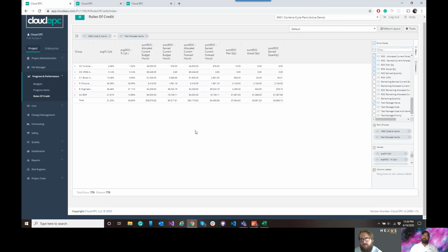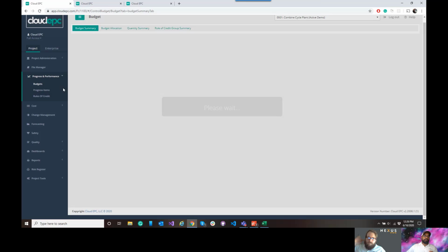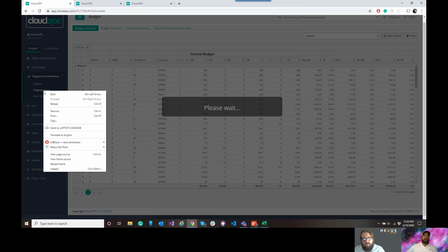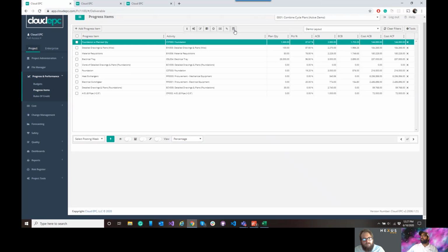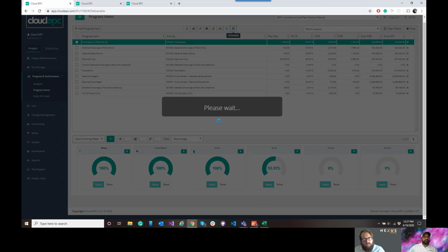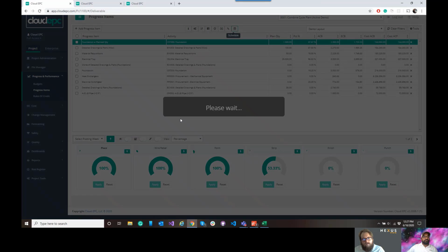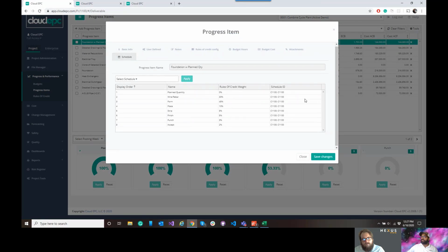And that's something that we're very proud of from being able to get down to an atomic level, and what, quite frankly, quantity surveyors have to live with every day in the field, but then also have to report back up to the scheduler. And so again, that's just one of the things I kind of glossed over with all the functionality, but we also have the ability to import our Primavera schedule into the system. And so just like we've been able to cost code an area, a test package, we can, and I use the term cost code loosely, but code rather, we can code our schedule IDs on every one of the steps.